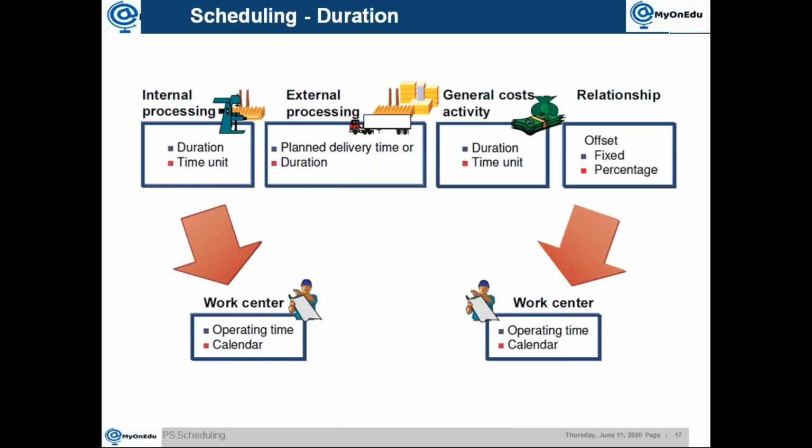Okay. So for that, your factory calendar, you can make it that way. The holiday calendar will have every day as a working day. So it will work like that. So you can create a factory calendar for that. But the factory calendar is common for all. Agreed, but you create another factory calendar and use it. What is the problem? Create one more factory calendar. It doesn't mean you have to use only one factory calendar. You can have n number of factory calendars.